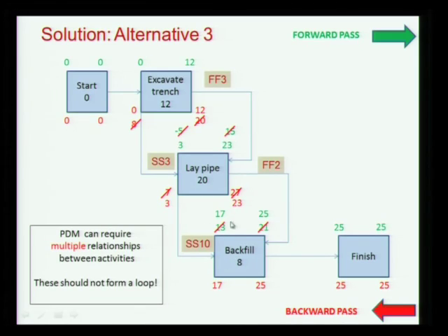Okay. So just to give you a little more insight on the question you asked, you're suggesting start this on 13 and extend it all the way to 25. Nothing prevents me from starting on 13, meaning I'm unconstrained. The only thing is then my duration hasn't changed. So right now I'm staying with constrained duration, meaning I'm constraining my duration to be continuous, the activity will be continuous.